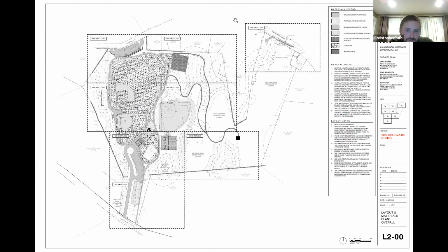Not at the moment. I'm very much a detail guy, so I think you guys have done a fantastic job so far. So if I pick anything apart later on, please just know I think you've done a great job so far. We consider it a compliment, Chris. In my previous life, I was the one bidding this and looking for holes, where it is public work. I try to make the plans encapsulate every last little detail because I'd prefer not to get killed on change orders in the back half of it.